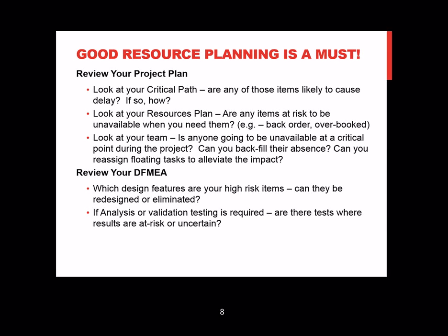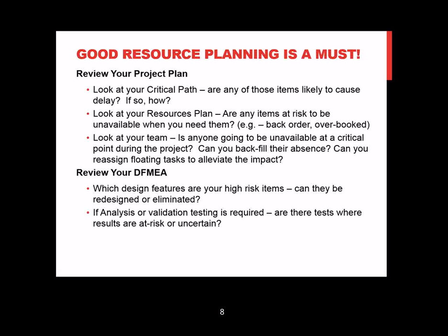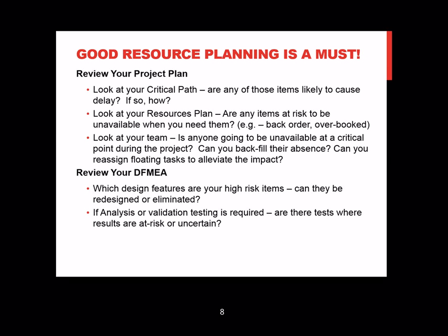Also, if analysis or validation testing is required, are there tests where the results are at risk, or that it is uncertain that they will meet your pass-fail criteria? If that is the case, then you want to make sure to get those items tested or validated as early as possible in the plan, so that if the answer comes back unfavorable to the project, you have sufficient time to deal with that item.